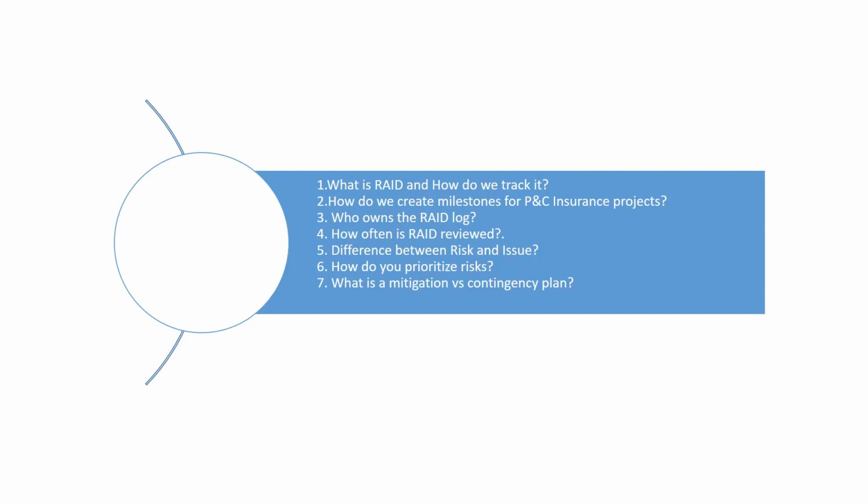The next question is: how often is RAID reviewed? RAID is reviewed on a weekly basis, like weekly in the delivery review. Critical risks are escalated immediately. Whenever the team or the manager finds any critical risk, it needs to be escalated immediately.